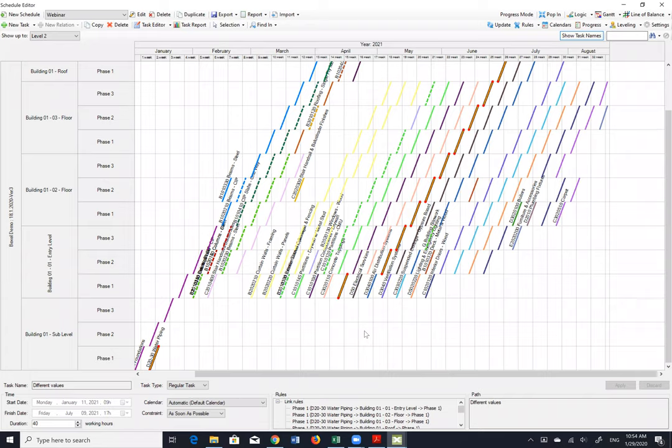There are always pros and cons when you have the float in the tasks. So you can start as soon as possible, but later you have the gaps, or there is another approach where you can move this and start as late as possible, then limit your float. And let's say it's based on Monte Carlo method, more risky approach. But on the other side, you have the one crew of the workers, let's say in one period, on the site, so much more optimal.